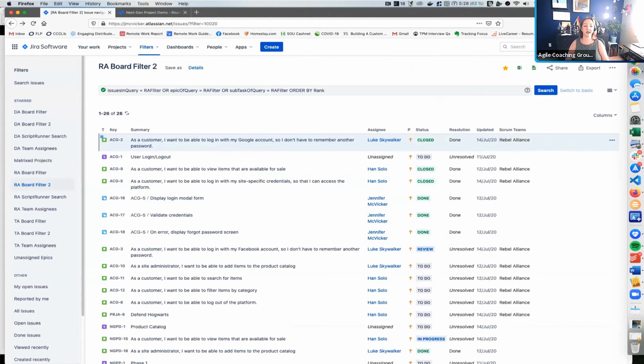How should we assign and write test and QA cases? There's a few different ways we can go about this. You can create an issue type called QA, or even a subtask called QA, or you can create a status in your workflow for QA. And when it moves into that particular status, you would reassign it to whoever the QA engineer is.